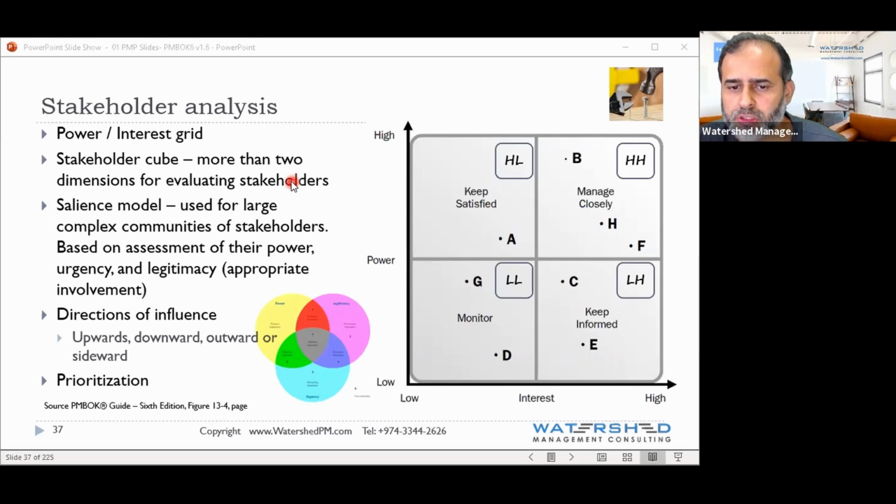they might ask questions about high, or they might possibly ask, see what you see here. See here, this your strategy is manage them closely, right? So again, there's the kind of questions possibly they can ask. One example of that is they can ask you to differentiate, or they can ask you what might be your strategy. This is your strategy and how you deal with them. These guys you manage very closely. These guys you keep them satisfied. Okay, and these guys you keep informed. Right?